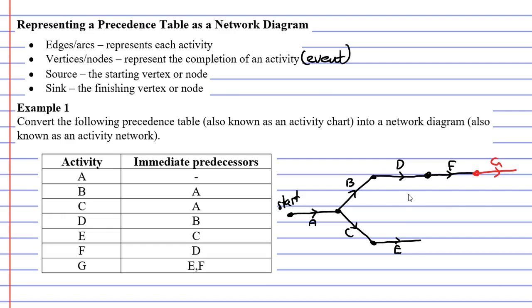And if it also comes after activity E, I need to finish activity E and label my edge as G as well. Now this is an issue because you're not allowed to have two edges with the same letter or the same activity. You're only allowed one edge per activity.